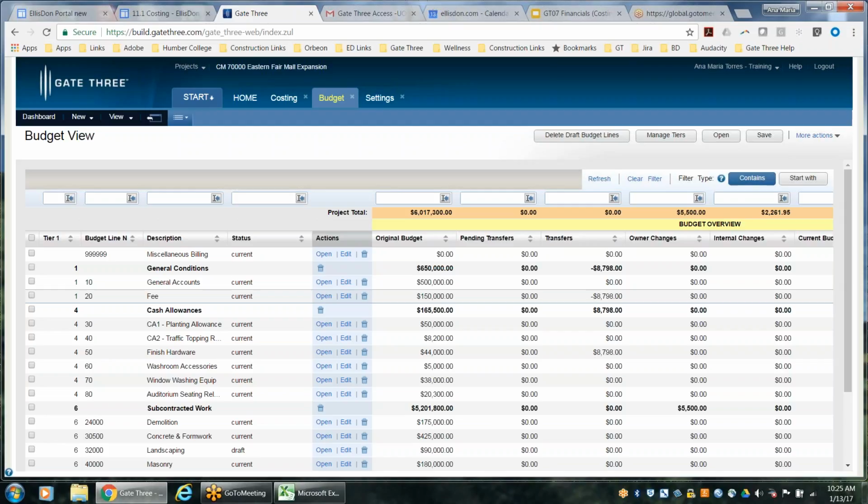Okay, so what you can do is manage that by creating an internal change at the time. Sorry, I didn't get that one. Managing an internal change between ourselves and the subcontractor. Between ourselves and the subcontractor is going to be a contract. That's right, but you have to create an internal change to increase the subcontractor's contract. Okay. But I don't have a contract with them yet.